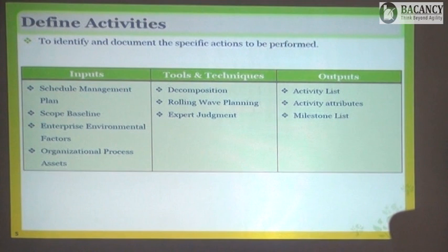Okay. Then mix them. Mixing is an activity which has dependency on two activities. What are those two activities? Boil tomatoes and prepare spices. If tomatoes are boiled but spices are not ready, you cannot mix them, or the other way around. If spices are ready but tomatoes are not boiled, you cannot mix them. This activity can be started only when these two are over. And once you have mixed them, then only you can say that yes, it is ready to serve.